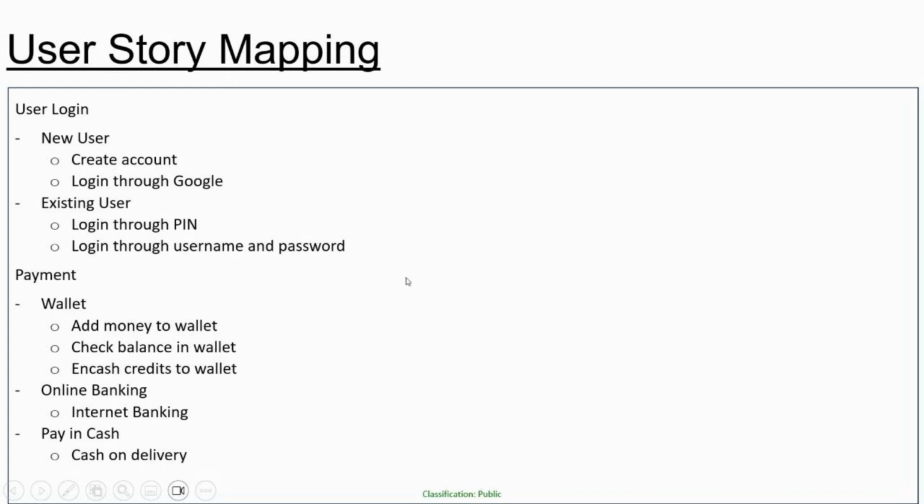But then there will be a certain set of terms and conditions which will be common across multiple user stories. For example, before going to sprint review, the user story should be thoroughly tested, and the QA should give a sign off on that particular user story. Now, this is required for every user story, right?